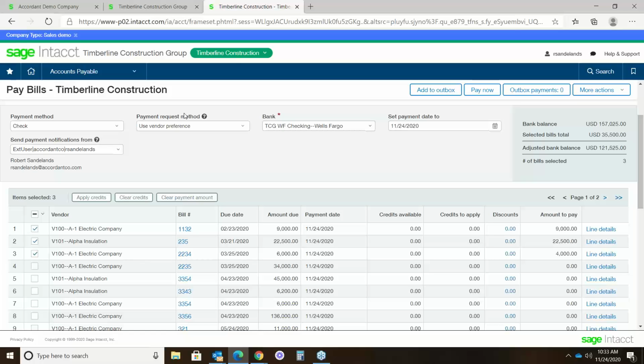Don't have time to get into the retainage, but the big thing there I wanted to share with everyone is that retainage now has a release feature. So when you enter an invoice for 10,000, 1,000 is out in retainage payable. You can now release it. It creates a retainage invoice, and you can release it as a percentage or amount of the total.